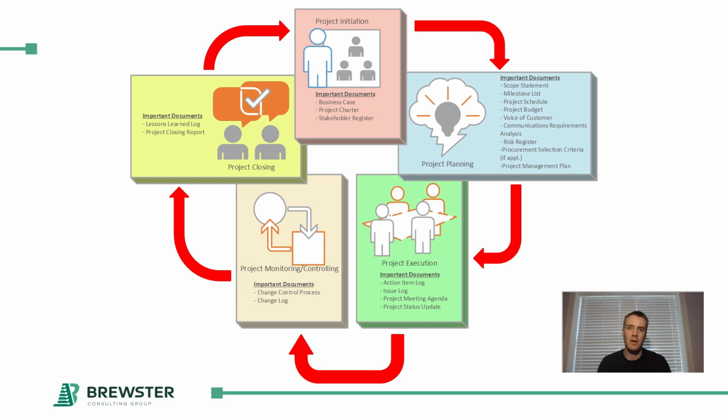If you get 2 or 3 months into a project and there is an opportunity for scope creep, as we call it, that is additional scope coming into your project. That could delay your project. It could result in increased costs, even though it might be of particular benefit to your organization. You'll have to go through a change control process if that's something that you want to pursue, which we'll talk about in just a couple of minutes in the monitoring and controlling process group. So your scope statement, again, is essentially what you are setting out to achieve with your particular project, and specifically what you're not setting out to achieve.